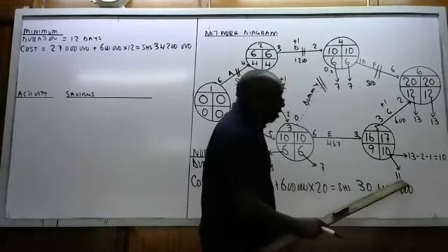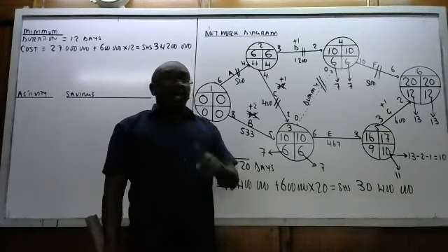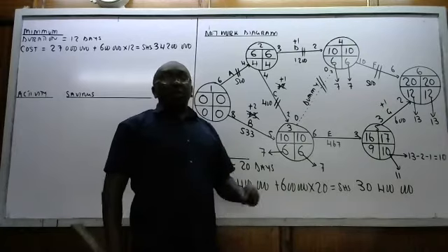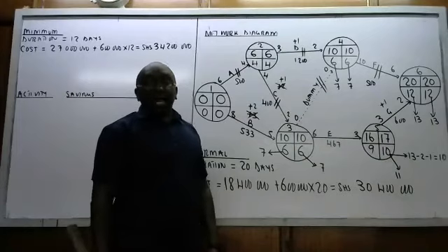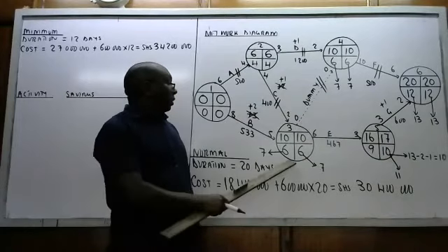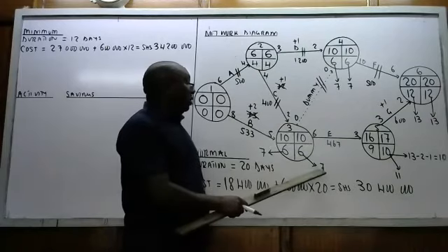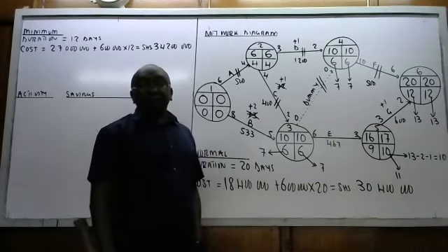So it's not now 11. Let's see whether this one, which is preceding, will allow this one to start by day 10. E can start day 7, so 7 plus 3 is equal to 10.